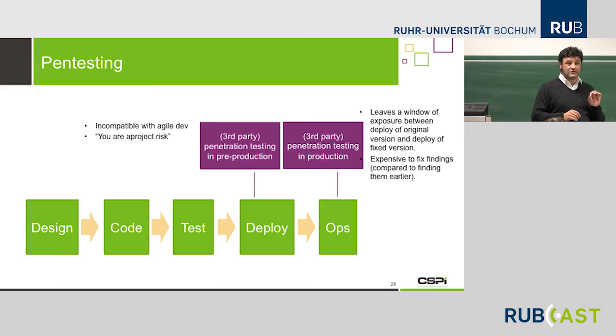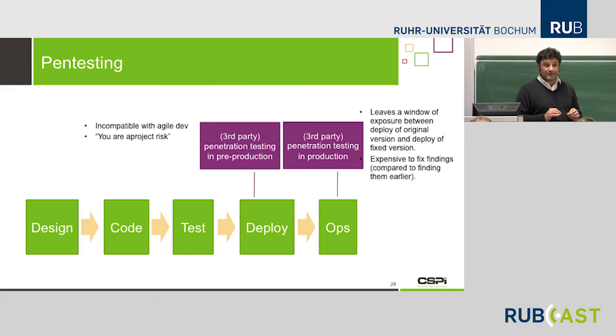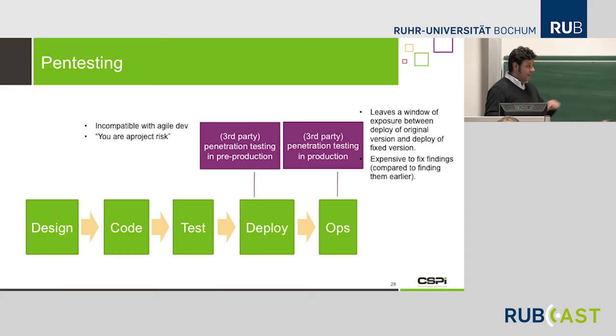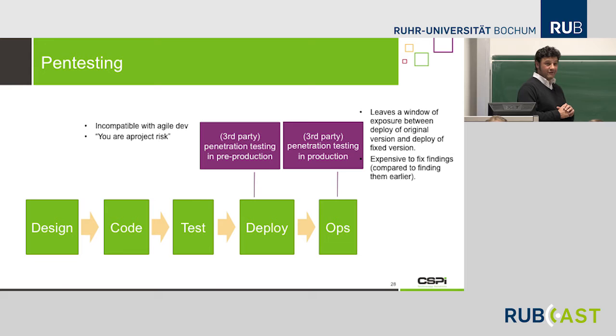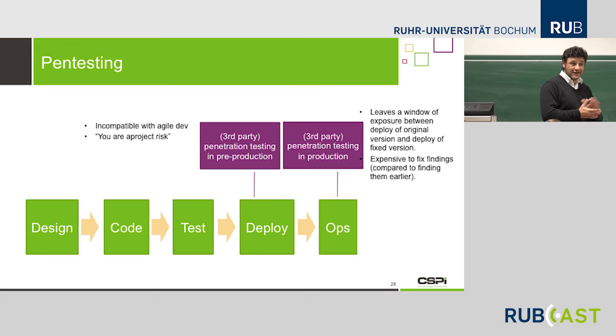But you also need to consider that when you identify some issues, they still need some time to fix them. Yeah? Again, the experience is that they often come really close, some days before go live, and say, it's okay, we can do the testing, we need, let's say, 10 days. But then after 10 days, they have no time to fix it. That means that at the end, worst case, we identify a big issue and they can't go live. Yeah? So everything comes to the point that you do risk management.